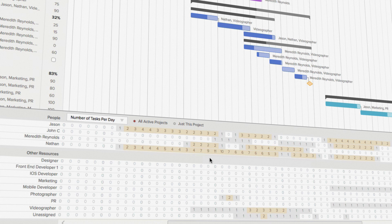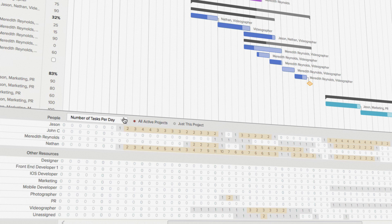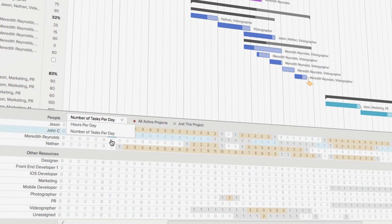The default setting shows the total number of tasks assigned to a person or resource across all active projects. You also have the option to show the number of hours assigned on a given day.